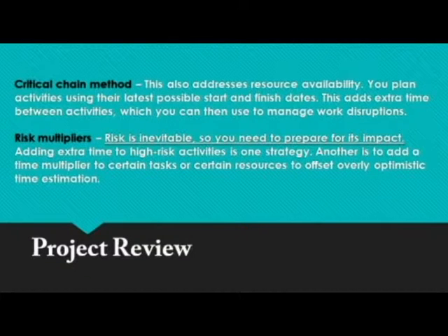Lastly, we have risk multipliers. So risk is inevitable, so you need to prepare for its impact. Adding extra time to high-risk activities is one strategy. Another is to add a time multiplier to certain tasks or certain resources to offset overly optimistic time estimation.